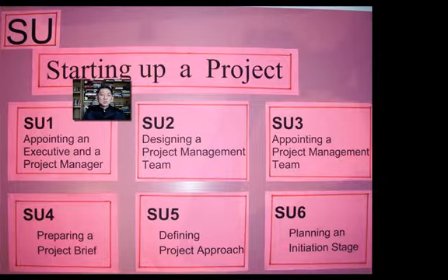Now, besides that, of course the rest of the project management team should be designed. Notice the word is design, not appoint. The reason is because very often, before you have actually started the project and gone into a reasonable amount of depth into the strategizing and the planning, which happens in the initiating a project process later on, you find that you really are not in a position to identify every single member of the project team. However, you need to decide what are the kinds of roles or responsibilities that are essential in this project.